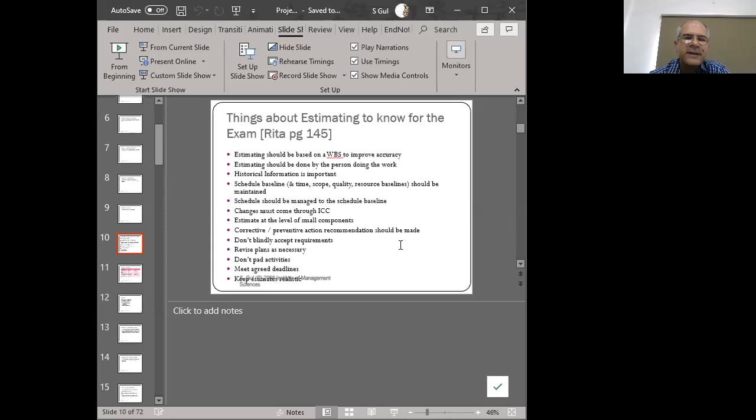Rather, we should be asking those people that do such activities on a day-to-day basis to give us an idea of how long that activity is going to take, right? So get the estimates from the person doing the work. Now, if you have some historical information, please do use it, because that removes this blankness from the picture,